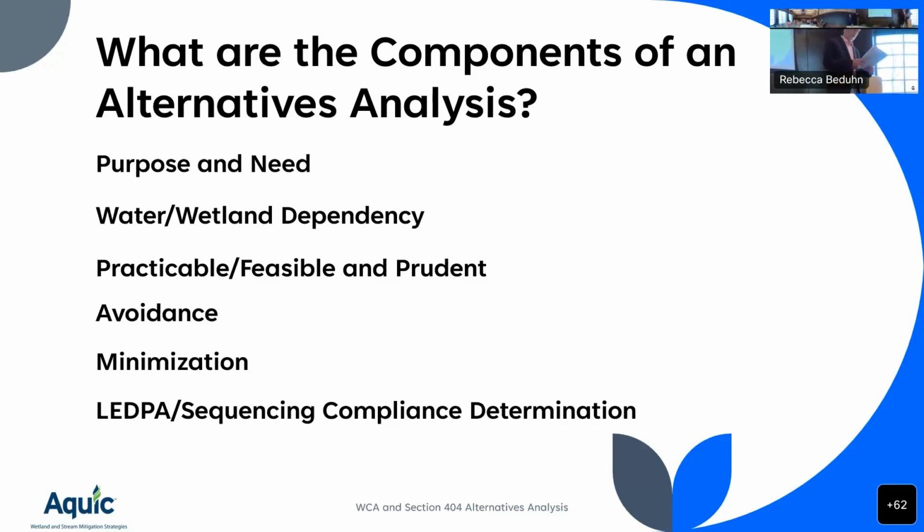That isn't actually on there as part of the alternatives analysis, but identifying those is really key because when you look at alternatives, and we may ask you to look at certain alternatives that seem obvious or come to mind that maybe weren't in an application to begin with, we're going to ask you what the screening criteria are. What do you have to have? And identify those things first. So alternatives then is kind of a big word, and it includes avoidance, minimization, and all that kind of stuff.